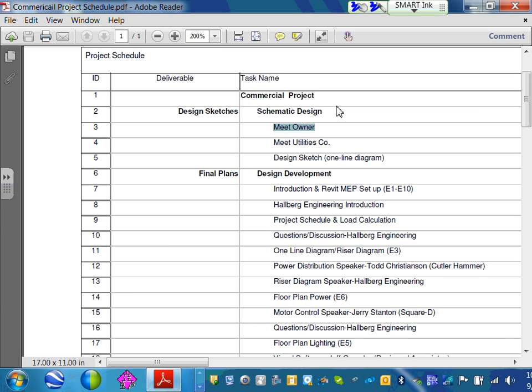The project engineer, typically, that would be my job when I go to BKV. I will meet with the owner and say, you guys remember that sheet that I gave you at the beginning that says whether a receptacle is going to be coming? That's what you try to get out of this owner. Schematic design. Tell us what you want to do. What size of the building? So meeting with the owner, get information about that building that you build from the owner. Can I have thumbs up, Chad? As much info and come up with a narrative.